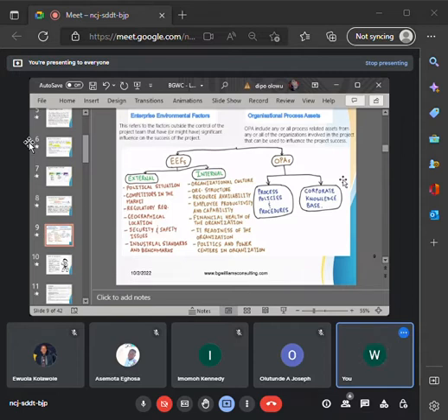They talk about it. Oh, we did not do this one well. The money did not come on time. We should tell management to release funds on time. Oh, we did not start this process on time. Or maybe next time we should arrange the work in this direction. It must be written down. Then you ask your question, okay, what can we improve on if we have the opportunity of carrying out the project again? These 3 questions symbolize a lesson learned discussion.